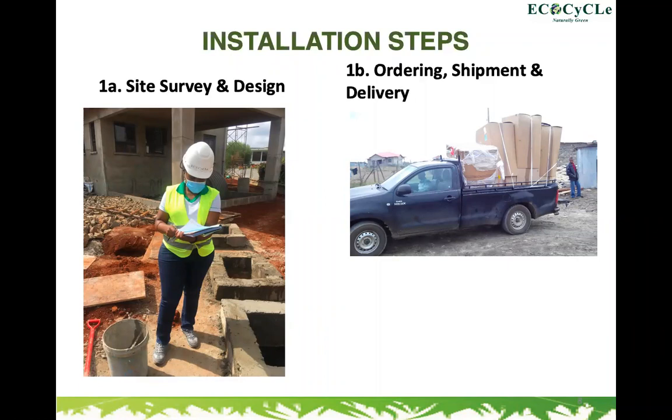So what happens is we order for your system, and then as the tank is being constructed, the delivery process is ongoing. So our timelines are in such a way that at the end of the tank construction, which is usually about 8 to 10 weeks, the system usually has arrived, and then once the tank is over, installation begins. Next slide.